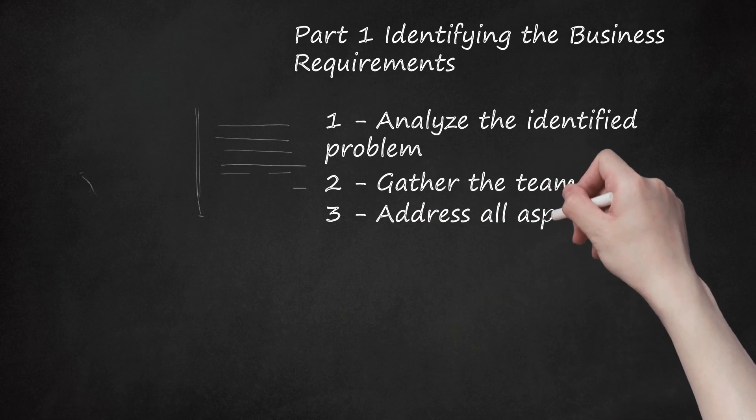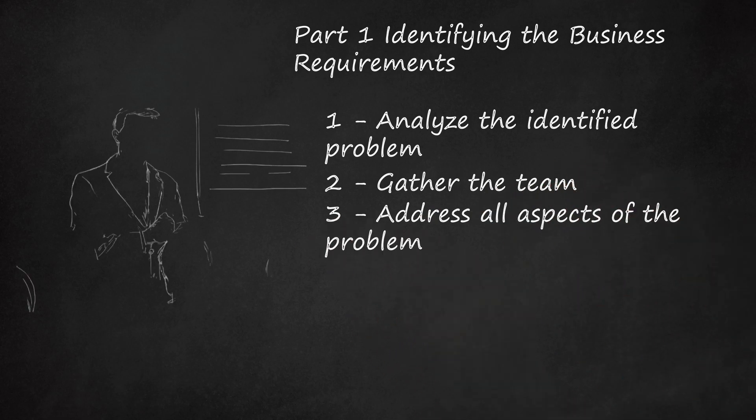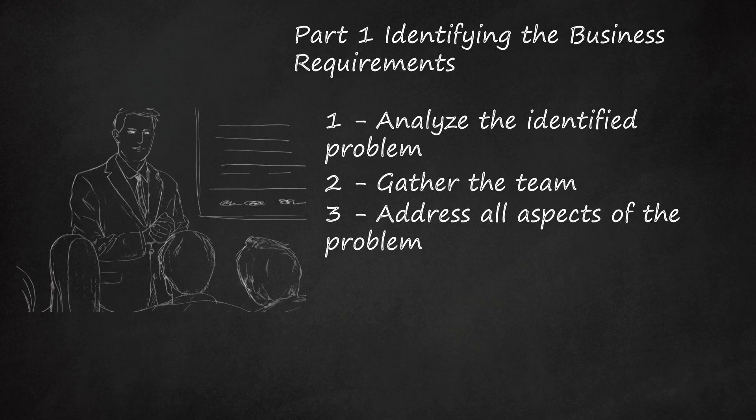Step 3: Address all aspects of the problem. That is, the problem statement should cover what the problem is, of course, but it should also cover who it affects, where it is happening, and when it is happening. It should also address what the problem is affecting, besides people.